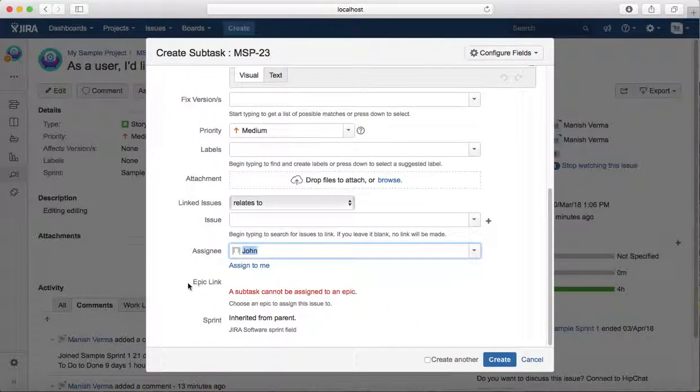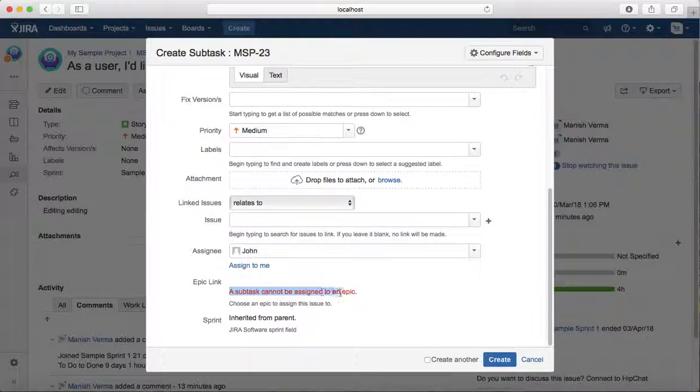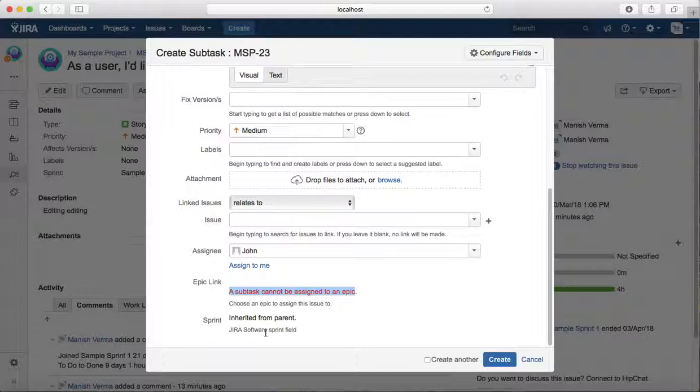A subtask cannot be assigned to an epic, so that is not possible. You can see that message here. The sprint is inherited from the parent because a subtask cannot be a standalone issue in Jira.